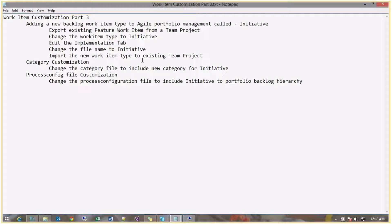In this video, part three of work item customization, we'll discuss agile portfolio management — specifically how to add a new level into agile portfolio management. Currently in your team project you'll have Features, then Product Backlog Items (if it's a scrum-based team project), and Tasks. Let's say I want to add a new work item type above Feature called Initiative. So the hierarchy will be: Initiative, then Feature as a child, then Product Backlog Item as a child of Feature. You can add up to five levels including Feature — for example: Feature, Initiative, Theme, Goal, or Epic.